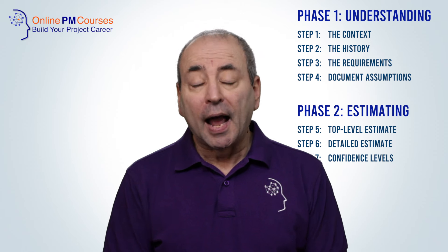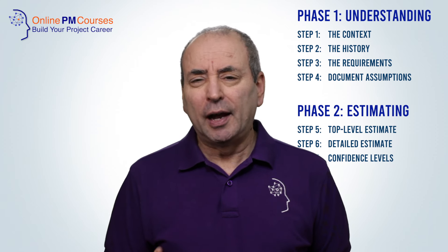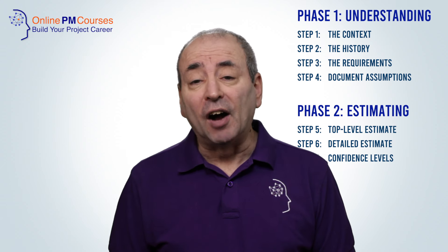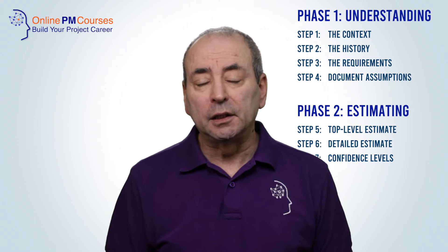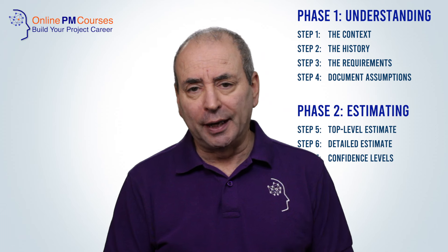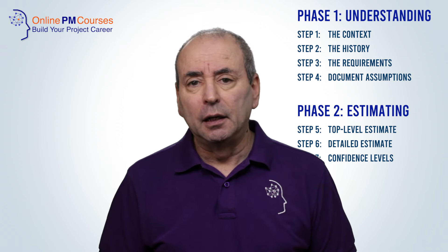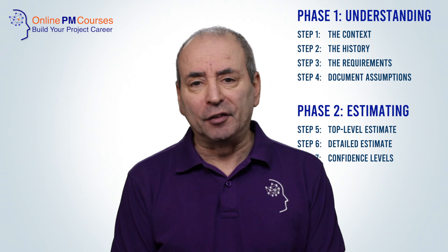Step seven is to express a confidence level for your estimates. Add confidence levels so that people can see how certain you are about the scale of your estimates — after all, an estimate only has value if we know how confident we can be in it. Confidence is the inverse of uncertainty. Experience, data, rigor, checking, and review will all decrease uncertainty and increase confidence. On the other hand, novelty, ambiguity, volatility, and complexity will all reduce the confidence you can have in your estimates.